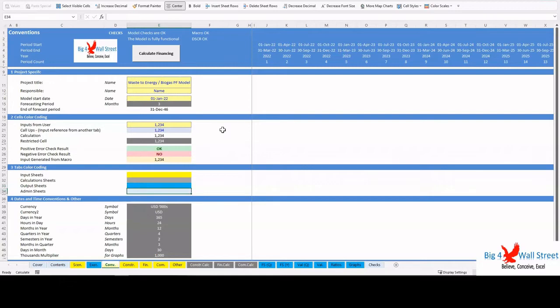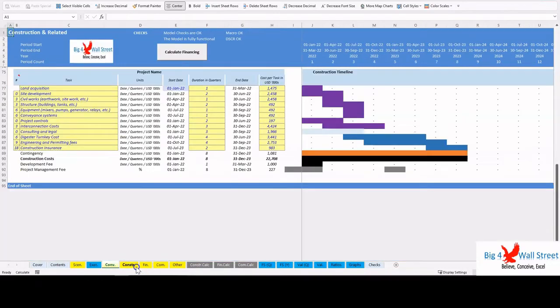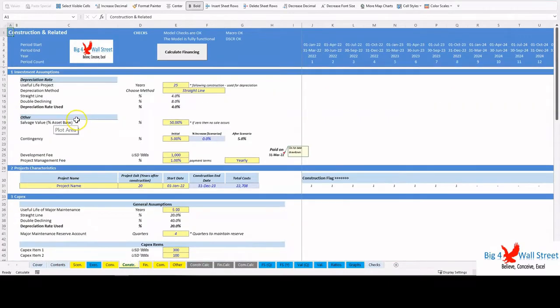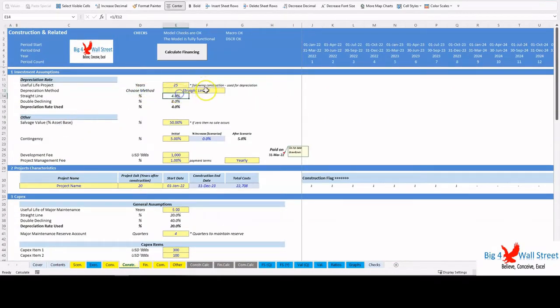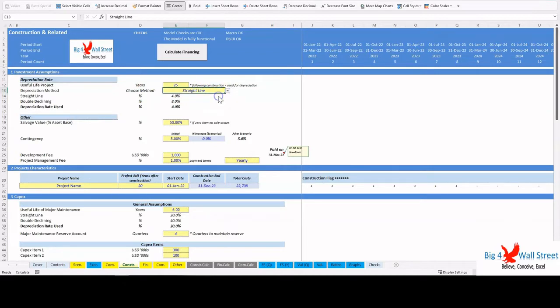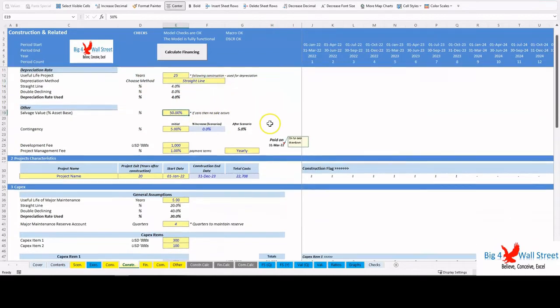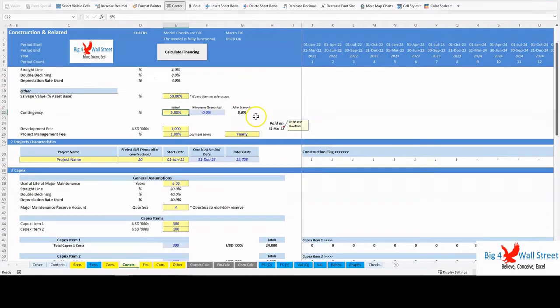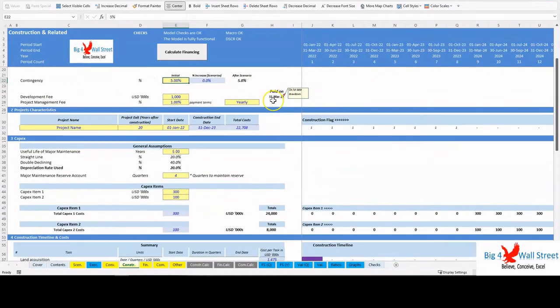The Construction tab contains the main investment assumptions such as useful life of the project, depreciation method (the user can choose between straight line and double declining), the salvage value at the exit of the investment, and the contingency percentage which will increase the baseline construction costs.